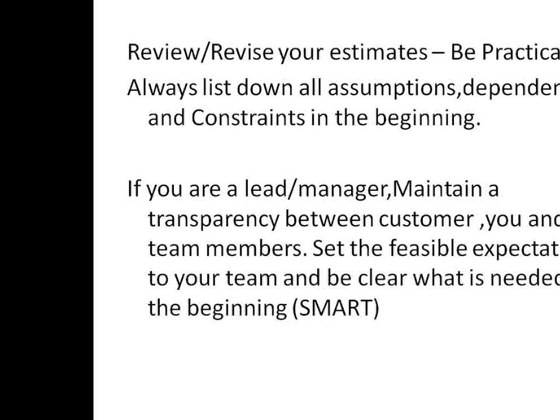See, normally we always have a habit that we do the estimation and then we forget it, like do and forget. It's a very wrong habit. Please try to revise your estimates. Discuss your estimation. Even if you are the senior manager, discuss with your team members. He may have some idea which you don't get. So always review and revise your estimates from time to time. More or less it should be stable, but it might need some correction, say 2%. Even 2% is important.